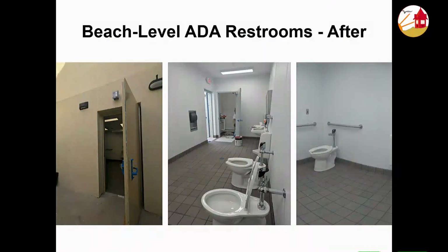Everything is done except for the toilet partitions, which we are waiting on. The expected delivery date of the toilet partitions is mid-December. We know when things get around the holidays, anything can happen, and everybody promises you the world, but that's what we've been told. We've been in direct contact with the supplier.